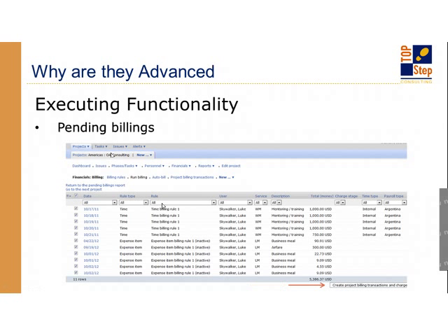In a recent release, I believe it was the November release, they included a pending billing detail report, which would allow you to run that report without actually executing any functionality. So it would run the report, but that is a detail report you'd have to configure. You can get all of the same detail that we're showing here, but you won't be able to execute the billing rules from that report.